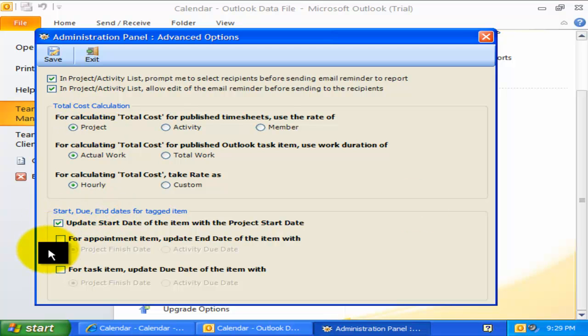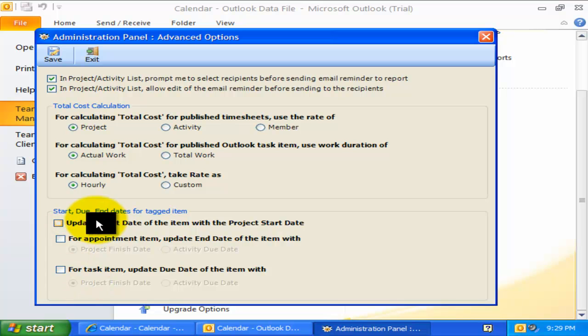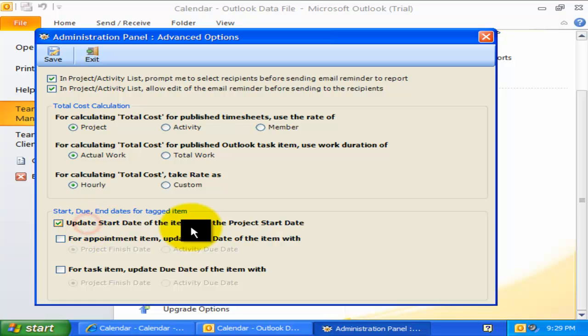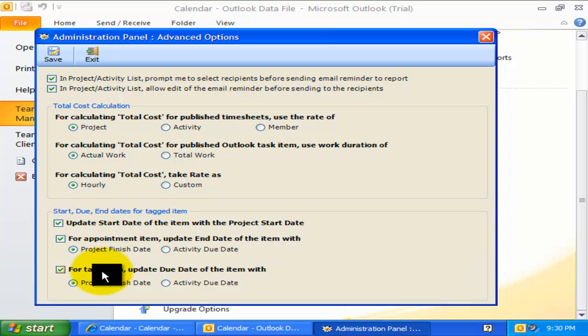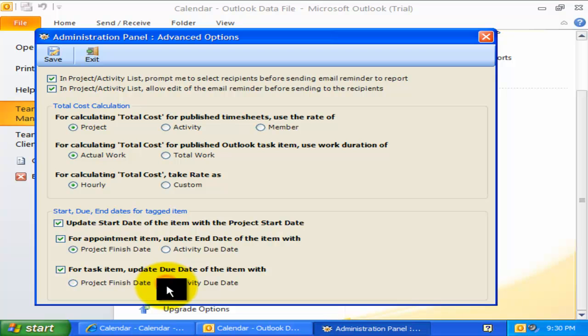With these three options, you can enforce project and activity timeline on appointment or task items for all members in Outlook. If this first option is enabled, when members tag an appointment or task item in Outlook, the start date of the timesheet would be automatically updated to that of the project's start date. Likewise for the end time and due date of the timesheet.